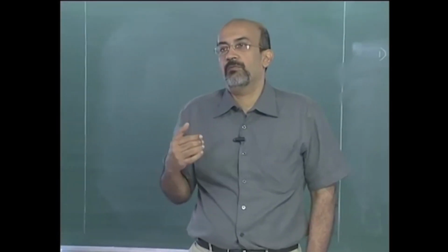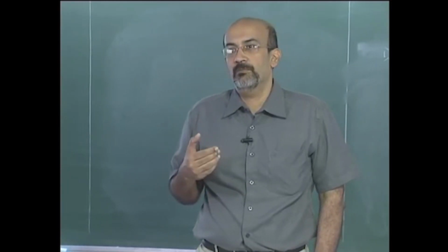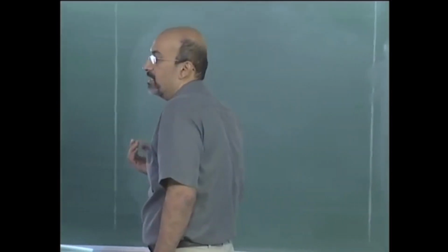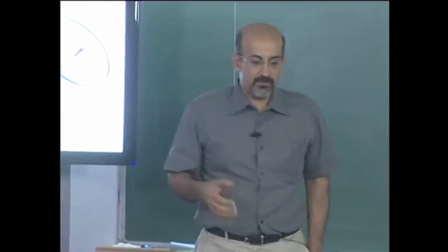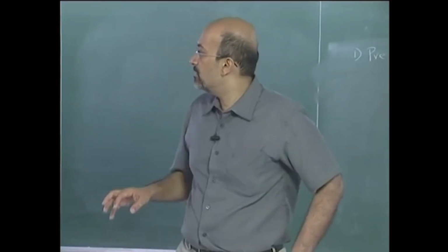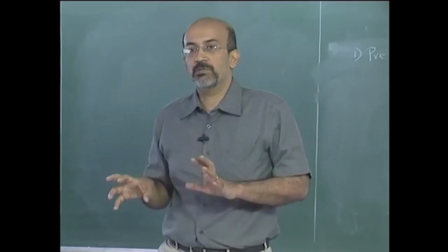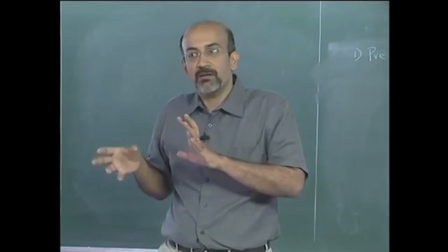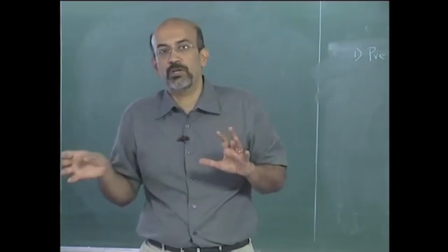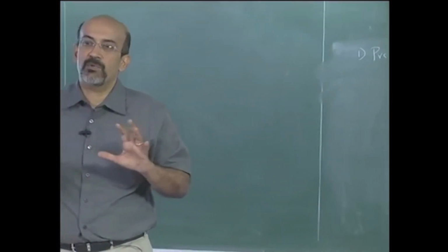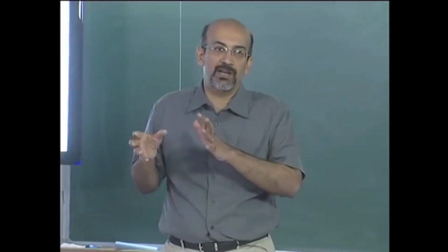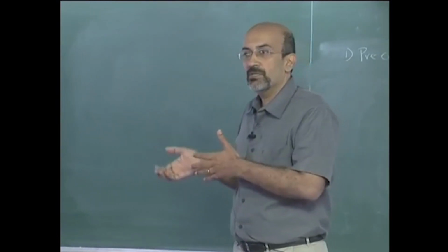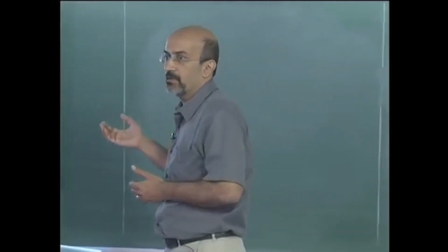So a lot of times it is tempting to use a complex tool for even a simple job, because of the charm in using a complex tool. We have seen many projects in which the team would say, I would like to use PERT because it is probabilistic modeling and I have a lot of uncertainty in my project, so I want to use a more sophisticated technique, but it might not be justified. Or I want to use Monte Carlo simulation because it really simulates my project, but the overhead of running it, the overhead of getting data to run it, just really does not justify using the tool. So the utility of the results you get out of it is just not there.